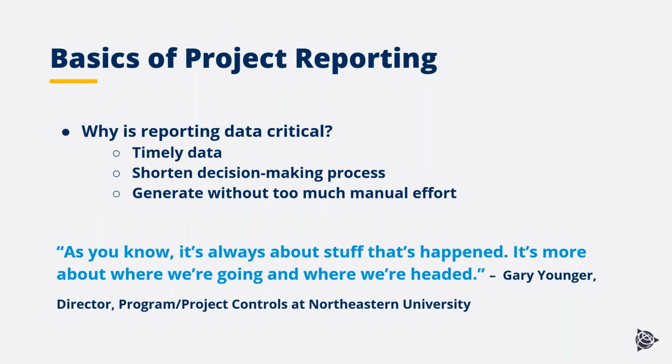An important caveat to keep in mind related to project management system reporting is the term junk in equals junk out. So if you invest in a project management system, you also need to have all the users of the system invest in making the proper inputs in order to effectively utilize reporting. You will not be able to manage project costs if you fail to properly enter a budget for each of your projects under management, etc. So that's the key commitment that must be made in terms of your own daily activities when investing in a project management system: committing to utilize the system on a daily basis.